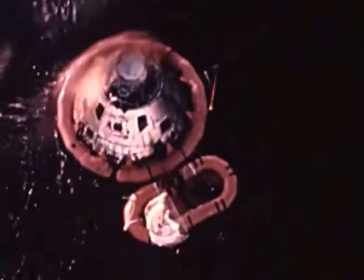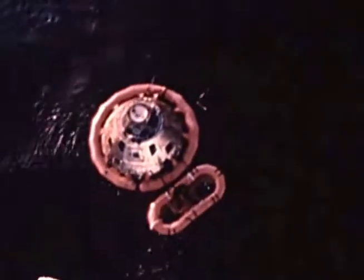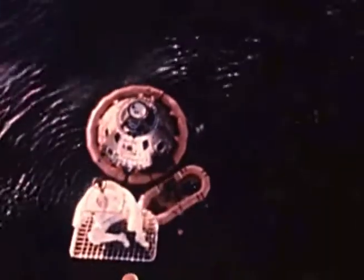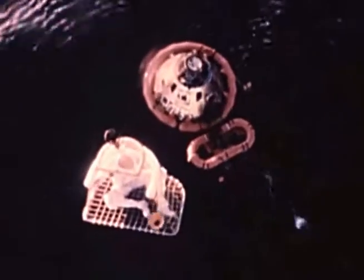On the morning of May 26, Apollo 10 announced its return to Earth as a triumphant streak of fire high in the Pacific sky. The precise manner in which this flight was conducted is illustrated by the fact that 4 months ago, the mission planners calculated exactly 8 days and 4 minutes from liftoff to splashdown. Apollo 10 returned a mere 35 seconds earlier than expected.